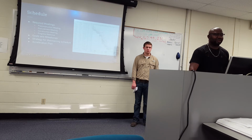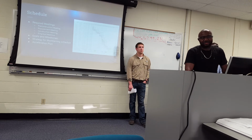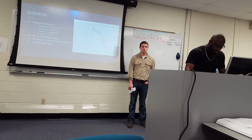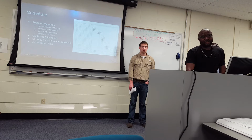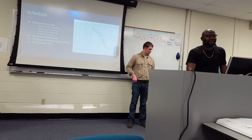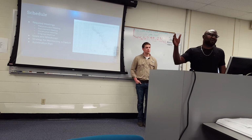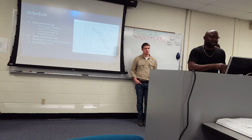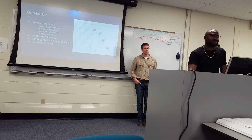For instance, just to give you an example, we have demolition and excavation based on the scope of work that needs to be done, which was roughly about 4.6 acres. In addition to that, we also tried to start some demolition on one end, and then as we're going halfway through the demolition process, we could start our foundation and excavation work.